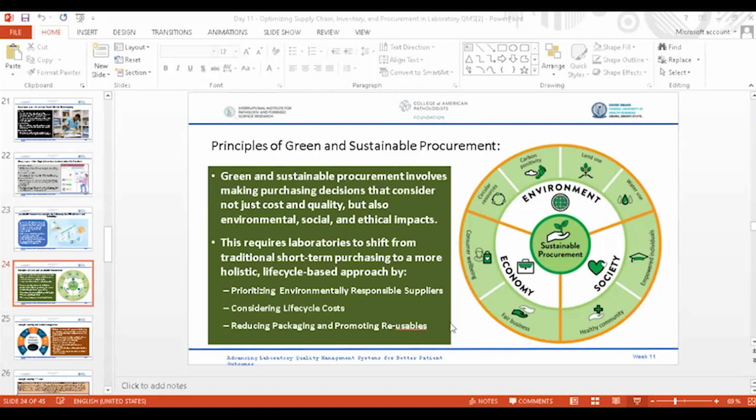Another one is incorporating quality and delivery benchmarks in contracts. Procurement contracts should be specific about your expectation of the product standards. For example, are they compliant with ISO? Are they compliant with good manufacturing practice? You should also consider the delivery times, compliance resolution procedures, and also consequences for defaults. This will ensure continuity of operations and reduce downtime.